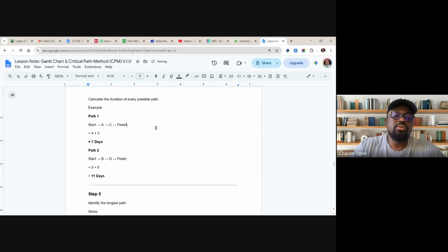Part 2 goes this way: start, B, D, finish. Under this, task B is 5 days and task D is 6 days. So if we add them, it gives us 11 days.